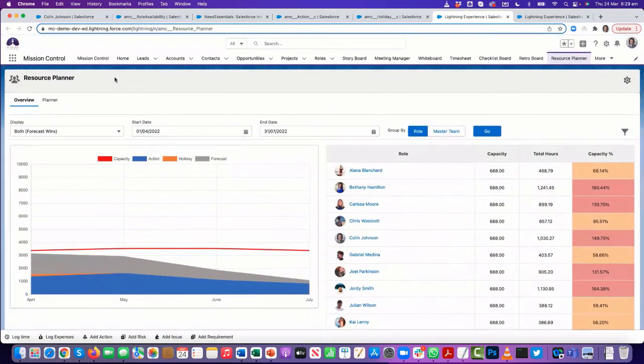So obviously, the benefit of this is that this will give you early indication of do we have too much work to deliver based on the resources we have, or vice versa. So certainly, we would be concerned if the blue bar ever ended up over the red, because obviously that's indicating that we've got too much committed work for the resources that we've got. So we're clearly going to have to do something to address that.